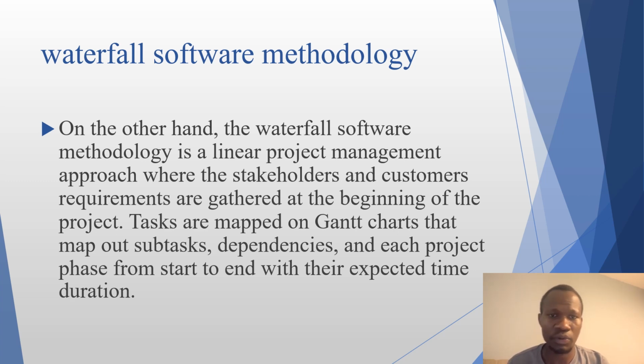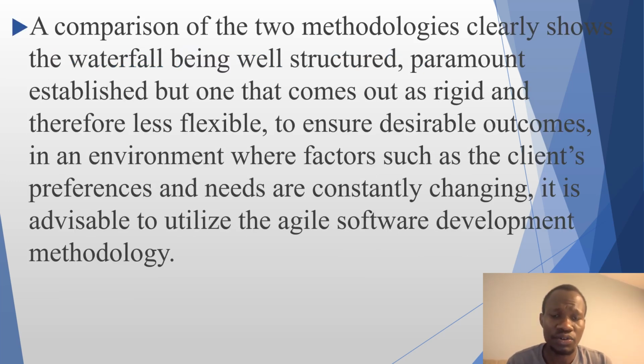So to add on the waterfall methodology, the tasks are mapped on Gantt charts that map out subtasks, dependencies, and each project phase from start to end with the expected time duration. So with this one, you also have to be an expert, with some experience in estimating what period it should take for one subtask to end, because you have to plan everything before you begin the whole process.